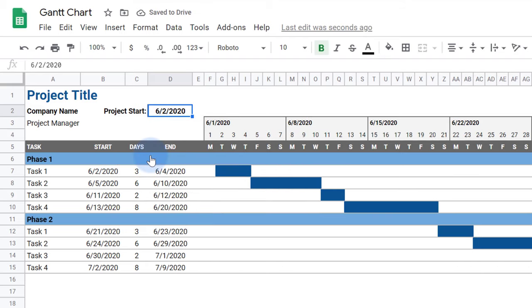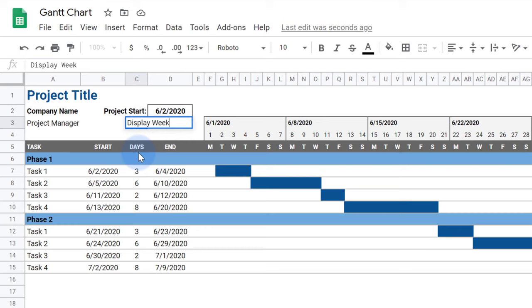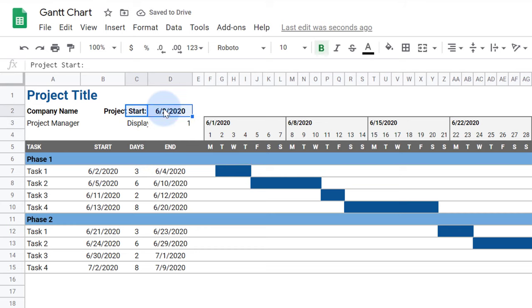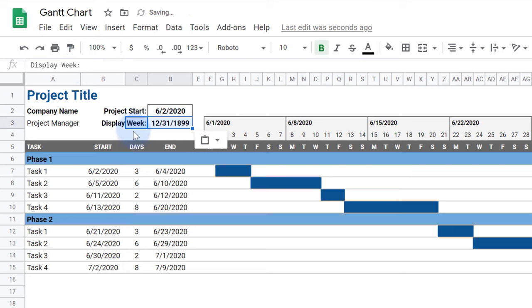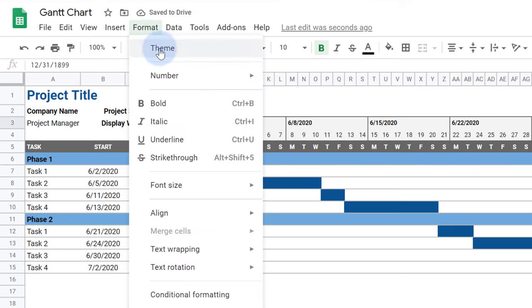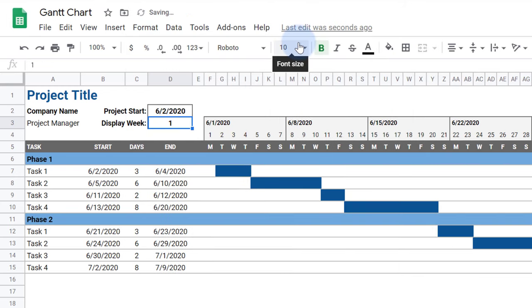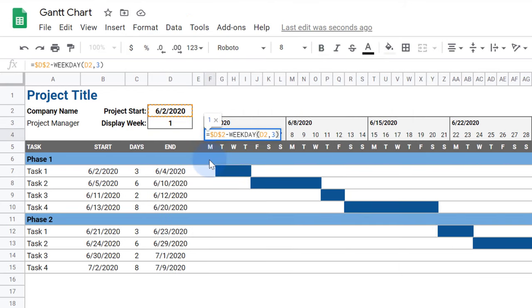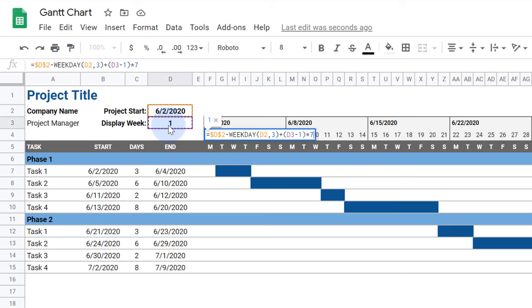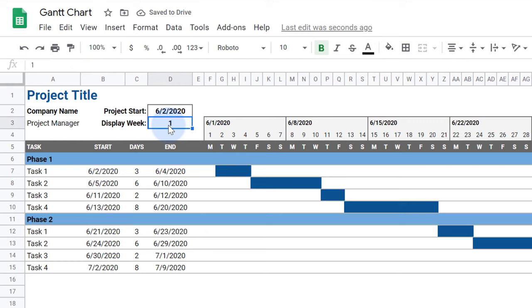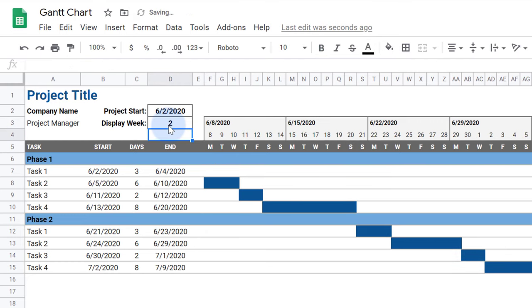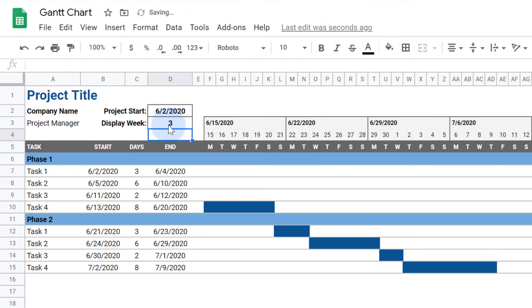Next, I'm going to add an input that lets you scroll through the chart. Under project start, I'll enter display week. Next to that, I'll enter a 1, and then I'll use the format painter to make it match the project start. I'll fix the 1 being changed to a date by going to format, number, automatic. Now I'll edit the first day in the timeline again to add the display week minus 1 times 7. Now when I change the display week, the dates in the timeline will update, letting me scroll through the chart.